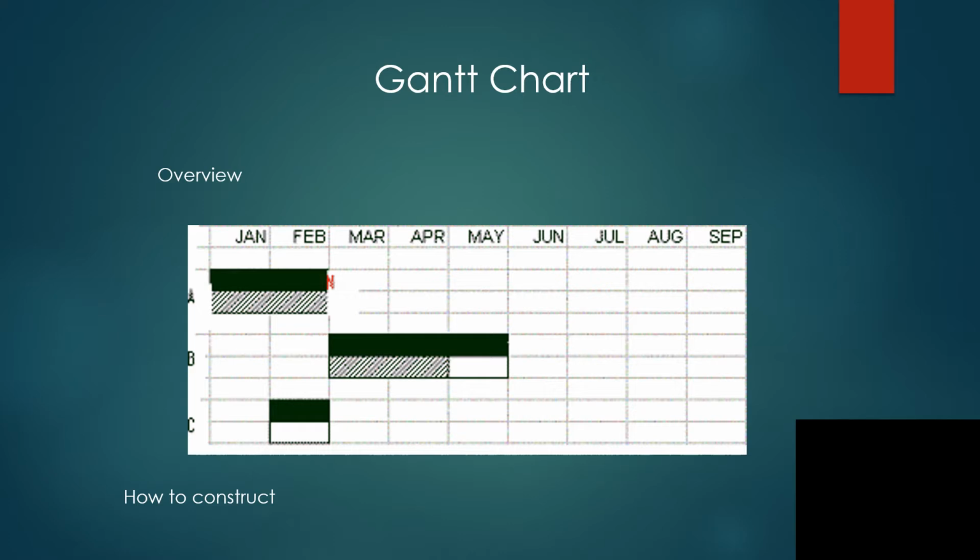Give names and numbers if necessary to project tasks on the left side of your chart as rows and dates at the top of your chart as columns. Use progress bars and milestones to exercise control. In this example, I identified progress bars by filling in bars underneath the solid black bars with slanted lines. I also added an M that you can barely see at the end of February to signify a milestone.